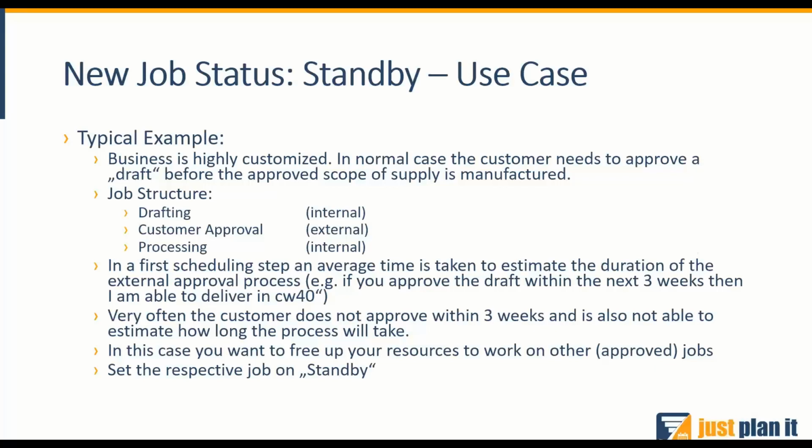Now, you usually can, in the first step, say, okay, let's give the customer a week to evaluate our drafts and get back to us, and if they get back within our week, we can commit to a very specific due date. And then the customer does not get back to you. And you maybe even give them a couple of days leeway, but at some point you need to say, okay, guys, if we didn't hear back from you, we need to free up the resources that we have planned for your processing parts for customers that did reply.